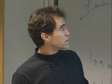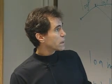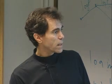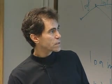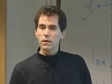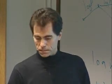So that shows you starting in October '87, ending in April '98. That was the plan. We actually took about 9 months more than what you see there because of all the problems that we had.